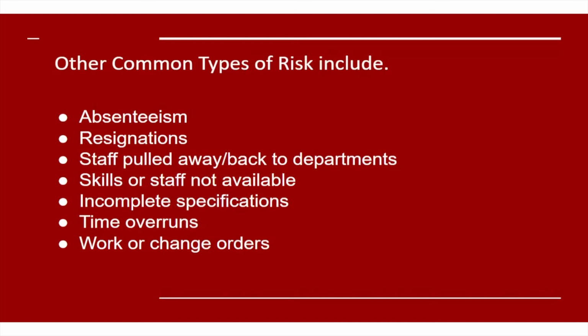Work change orders, and this is something that we've run into with the town, for example. We were very concerned when we built the new town hall. Change orders tend to drive up the cost of building because we realize something a little bit far along, and we say, oh, the roof needs to be replaced. We found that roof's bad. These are things that sometimes can't be predicted, but what you try to do is do enough planning so you don't run into change orders, because change orders can cost you a lot of money. And with the town hall, we did have some change orders, but it still wasn't that much. It was a couple $100,000 on a $2.5 million project.